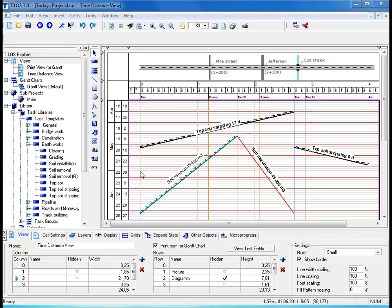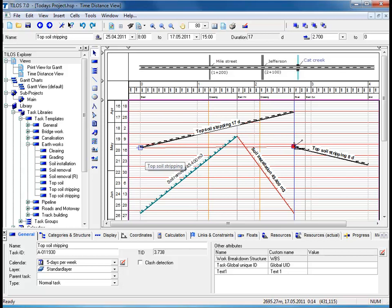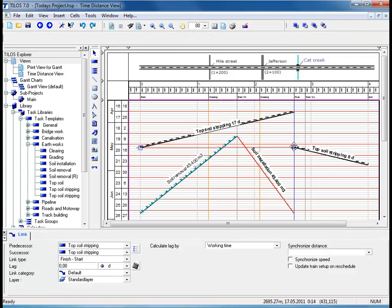TILUS has all the necessary features of an advanced project management system built in, allowing you to create links between activities and reschedule them. Linking activities is relatively easy: click on the task at hand, then using your mouse, click on the Linking Tool and drag it over to the task you would like to link. You will see an anchor symbol. Releasing your left mouse button finalizes the process, and you can see in the Details Toolbar that TILUS has automatically recognized the link type.